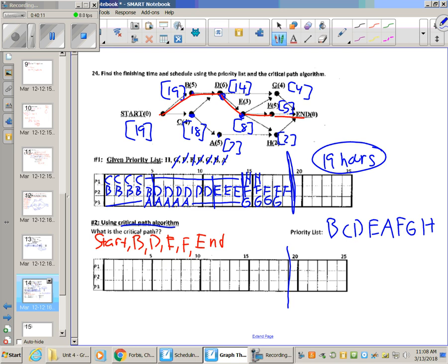So let's go through the process again. Okay, starting off with scheduling. P1, B, it is ready with processing time of 5. So I'm going to put 5 B's in P1. Okay, B's done. Moving on to C. C is ready. Okay, ready from the start. So why not just go ahead and give that to P2 as far left as I can go. 1, 2, 3, 4 C's.